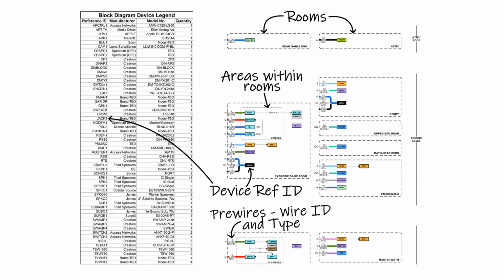Looking a little closer, each and every room is shown, including all devices, basic connectivity, and all pre-wires needing to be run, sometimes, as we all know, tomorrow. That's why this drawing was designed to be easily delivered almost immediately after the floor plan is done.